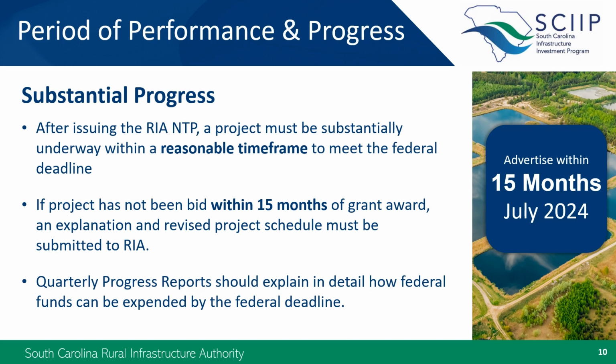The quarterly progress report, which is required to be submitted by the grantee, must reflect the current project status, detailed steps taken to address any delays, as well as explain how federal funds can be spent and the project completed within the approved grant period.